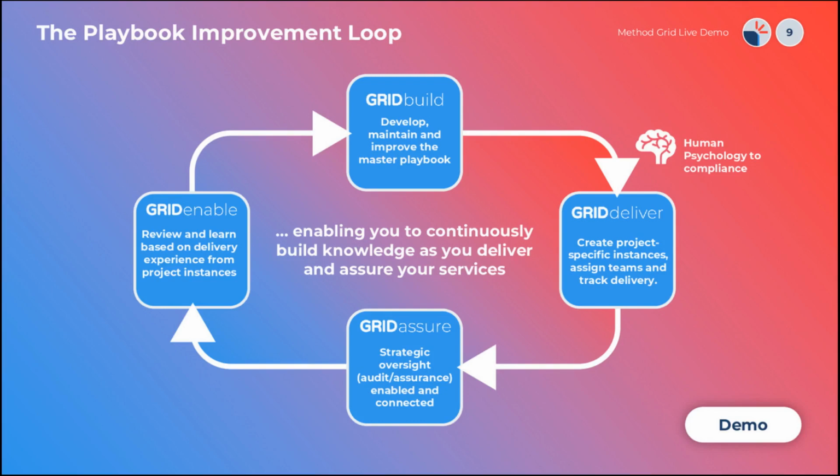A key reason for doing that is also trying to get the teams vested, so that the playbook is a way of helping them solve the solution. And then once you've cloned it and tailored it, you can assign team members to the activities. They can tick things off, but you can also add the assurance elements into it, which are the gateways, and you can specify which tasks have to have evidence uploaded in order to approve it.